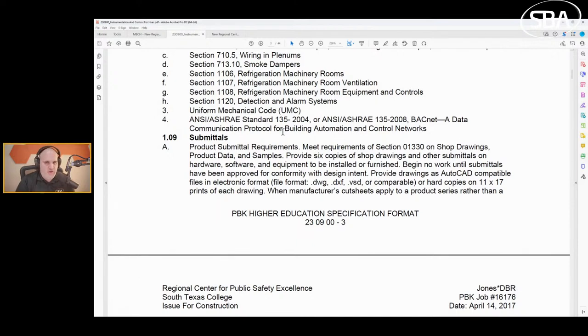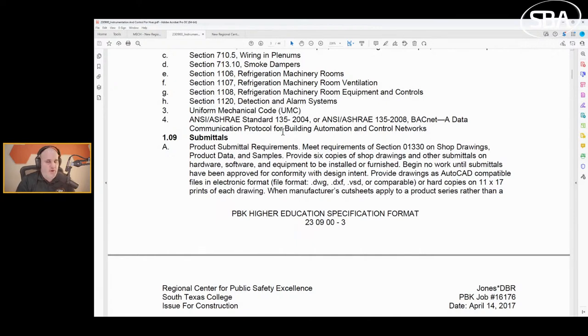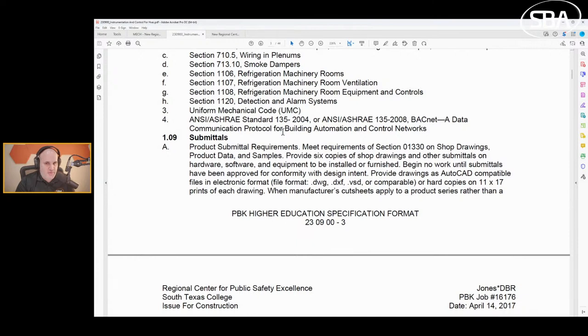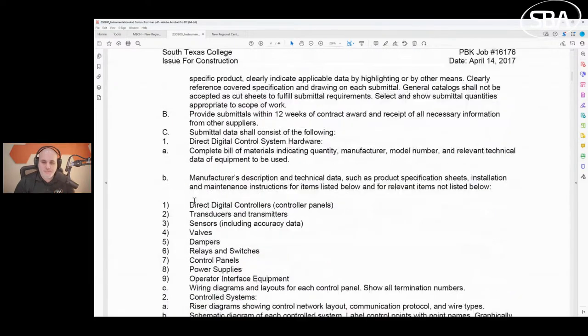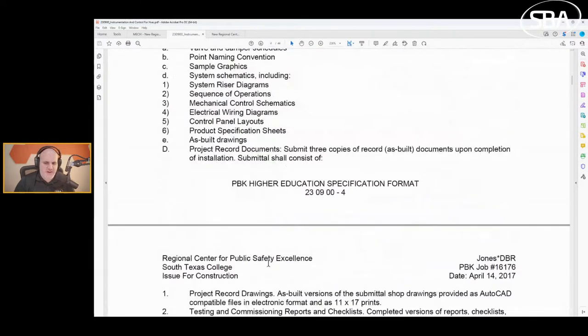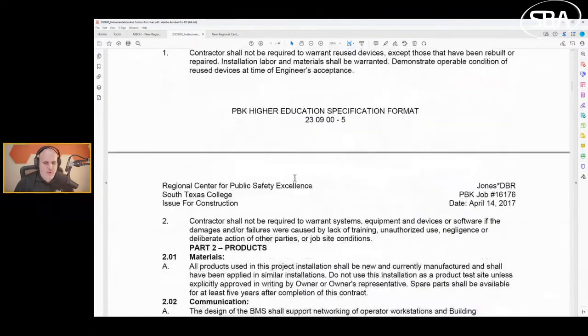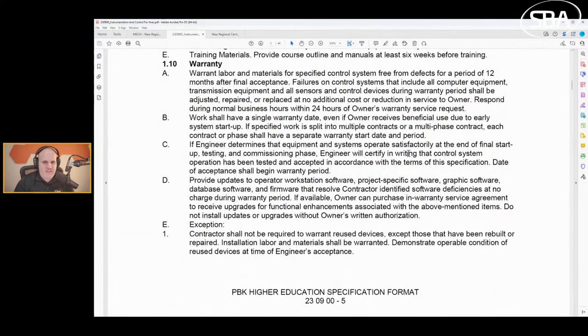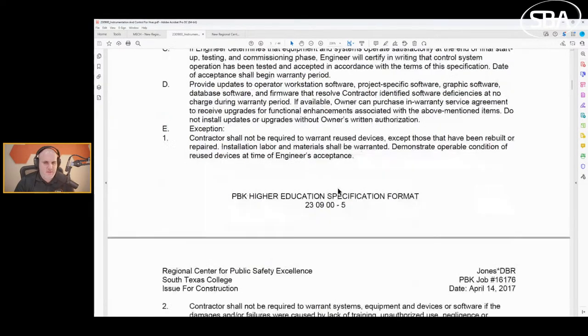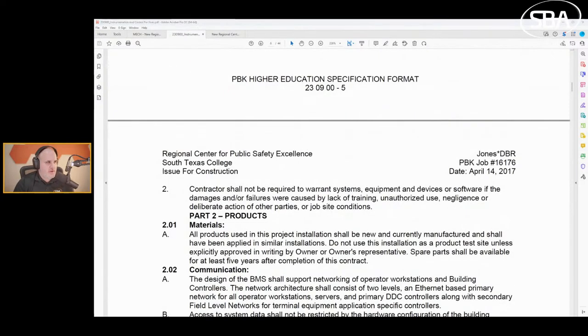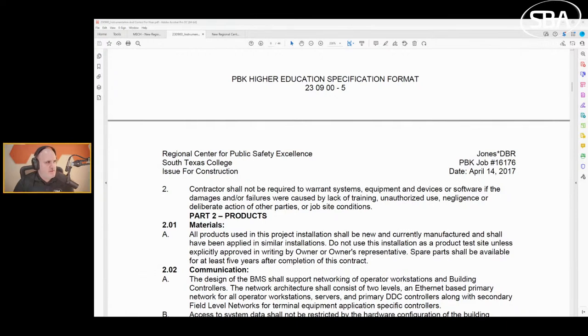We find our related sections. Related sections is huge because it's a way you can get ambushed with scope. Products furnished but not installed: piping control valves. When we read this hydronic piping, you're not providing the piping, that's the category. You're providing the control valves for the piping. You're doing control valves, sensor wells and sockets and flow meters. Does that mean you have to hot tap this into a pipe? No, because it's not installed under this section.